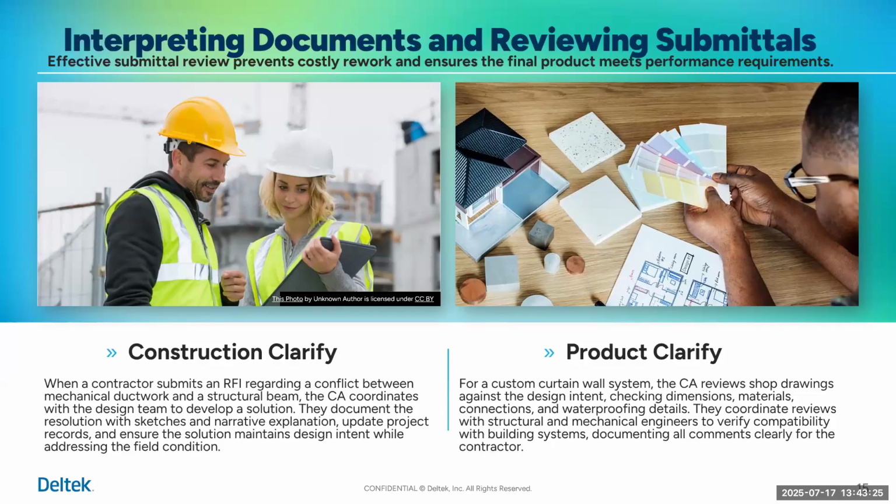Once the answer is developed, that information can be documented with the resolution and any sketches or narrative explaining the clarification. The drawings or specs are updated to ensure that later on down the line everything is well documented and that it did indeed address the field condition.